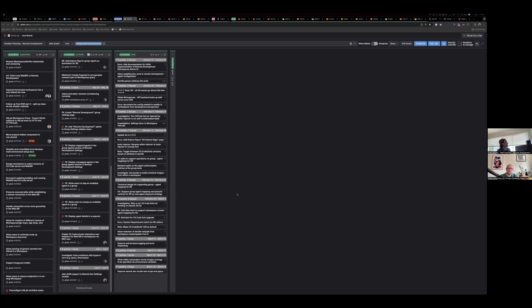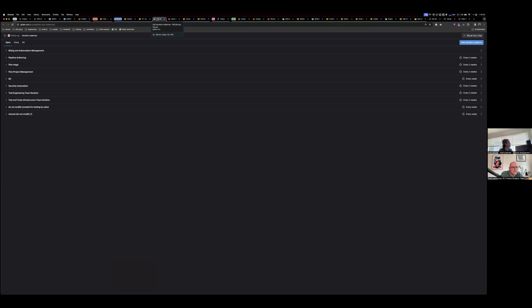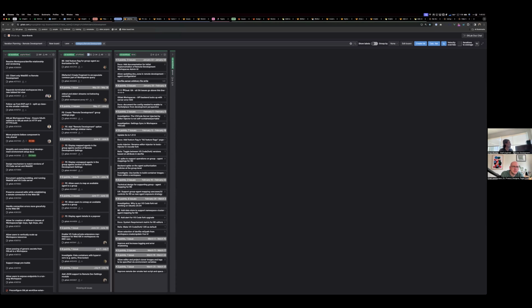If you look at our iterations, the way we design it, each of these in the done for the past iterations is actually an iteration in the database. And when this iteration rolls over, the current one, this week's iteration, anything that is open will automatically get rolled over to the current iteration, and whatever had been closed during that iteration will get closed.